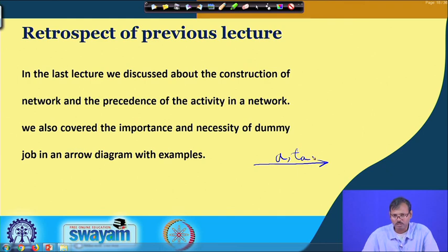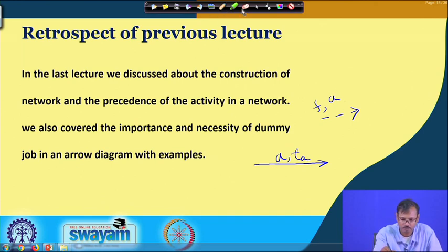So, the user is forced to use a number of dummy activities to complete the network, which are nothing but the dotted line, represented as dotted arrows in the network, and essentially those are of 0 length and 0 costing. Basically, 0 duration, 0 costing dummy pseudo jobs are added to show the precedence of the jobs for completing the network, which are not actually existing.